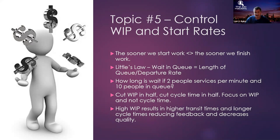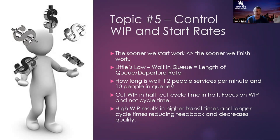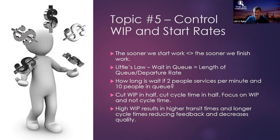Little's Law: how long we wait is the length of the queue divided by the departure rate. We can calculate what happens when we keep starting more things. If you cut the work in progress in half, you're going to basically cut cycle time in half. What Reinertsen recommends is don't focus on cycle time — especially when talking to business managers — talk about work in progress. Steve Jobs said the first thing he did when he came back was cut 60% of the work.